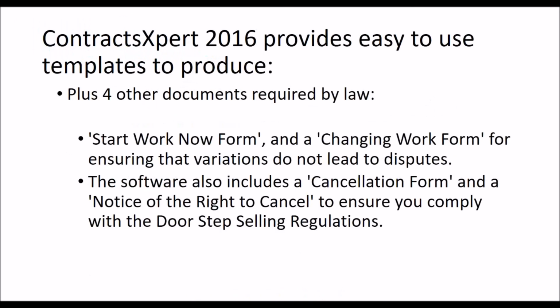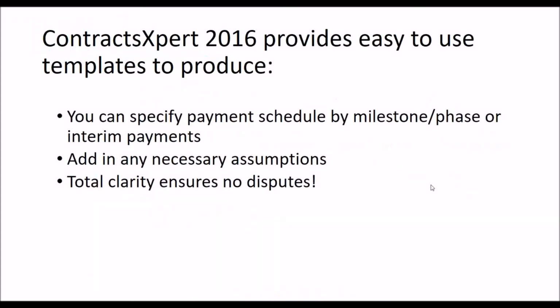You've also got some other documentation in there as well. You start work now form, changing work form, also your notice of your rights to cancel, as well as a cancellation form as well. You can specify payment schedules, phases of interim payments. You can add in any necessary assumptions, so you've got total clarity, so it just makes sure that there's no disputes.